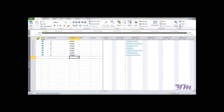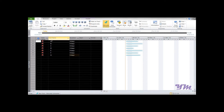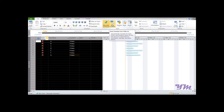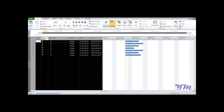To convert to Auto Schedule mode, go to the square cell selector at the top left and click it so the entire sheet is selected. Under the Task tab, go to Auto Schedule. This function automatically calculates the start, finish, and duration values for tasks based on dependencies, constraints, calendars, and other factors. Now all the bars turn dark blue, indicating Auto Schedule.